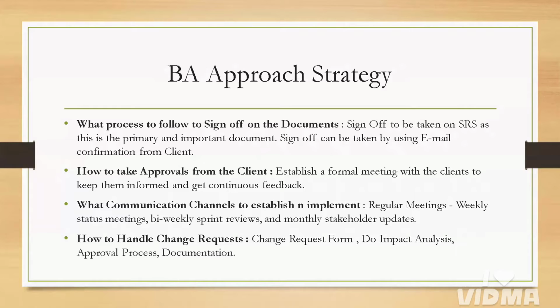And what processes to follow to sign off on the documents? After preparing the documents, we don't directly implement those requirements in the application. We should take the sign-off, the approval, from the client. Only if the client says okay should we start working on it, and only then will we start the implementation of the project. That's how we need to take the sign-off from the client. That is an important one.